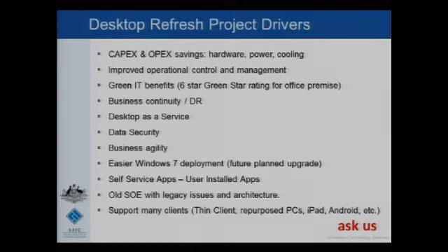Technical guys don't tend to focus on communication with users. We want to sit in our corner and do our stuff, but we had a person in the team who was basically dedicated to communicating with our users, and that was a huge success. Especially when we had the odd outage here and there, they were able to put a positive spin on the solution as a whole, stick little posters on the elevators and toilet doors, and let them know that we're really trying to be progressive for the organisation.